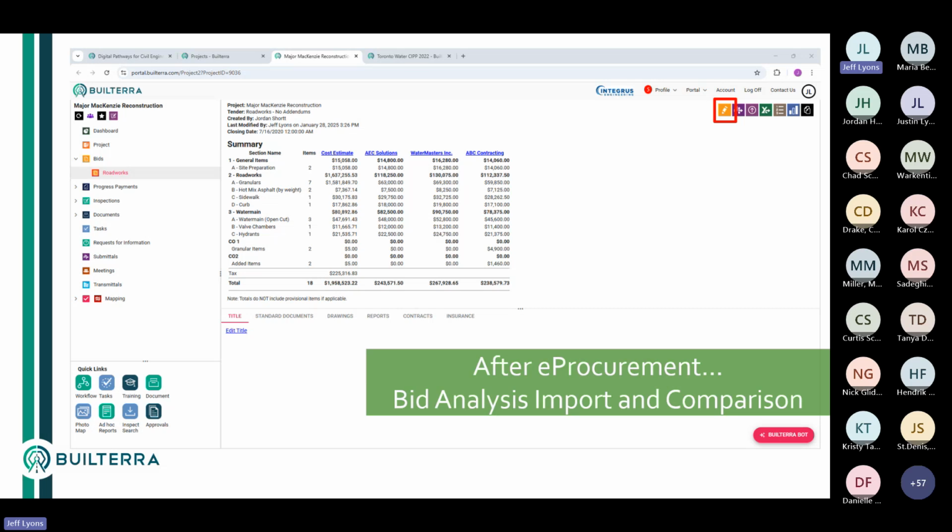So for that item, remember we talked about standardizing the items. So that means that every time you drag and drop into a new project, say for example, some curbing here, it knows approximately what your pricing is going to be based on the contractor's data. And so of course, some are going to be high, some are going to be low. We have all kinds of ways to get around that. But the idea is to start consuming the bid analysis data and leveraging it for estimating.